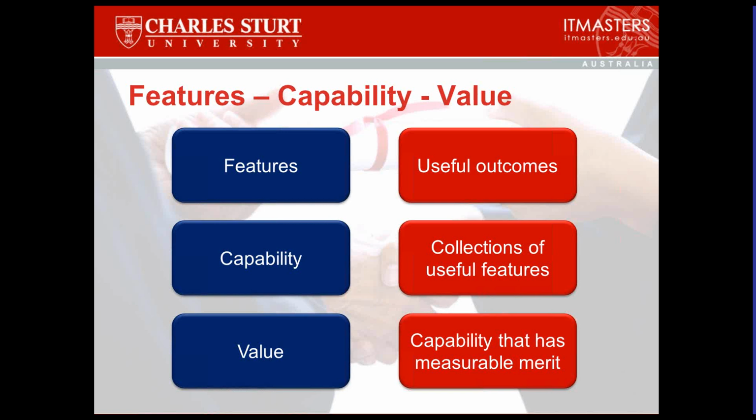Well, the first thing is, let's be clear that the reason we're holding short stand-up meetings is so that we don't waste everybody else's time with one person's problem. So first thing is, you might be better off tackling something on a smaller scale outside of the Scrum meeting. The Scrum daily meeting is the place to flag it, where someone says, I have a nightmare of a problem getting anything done. Well, wow, okay, that's big. Let's take that discussion as soon as we finish the Scrum meeting.